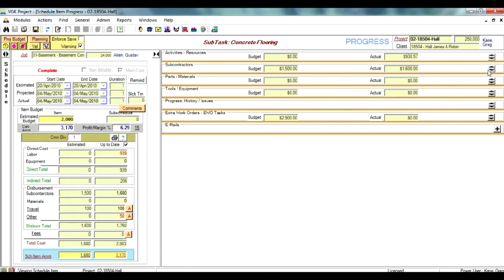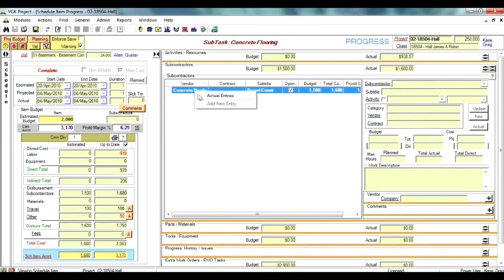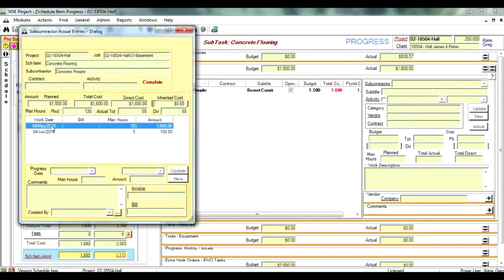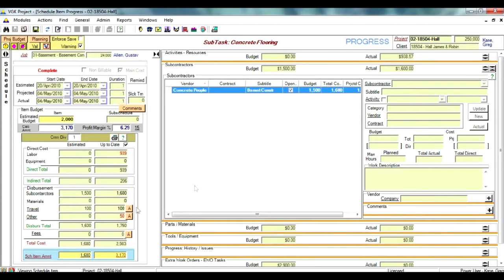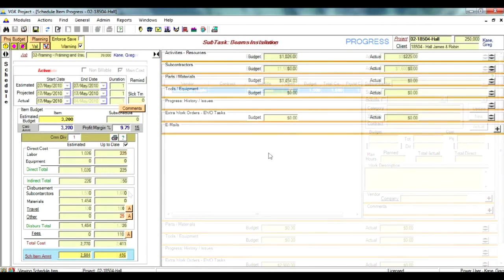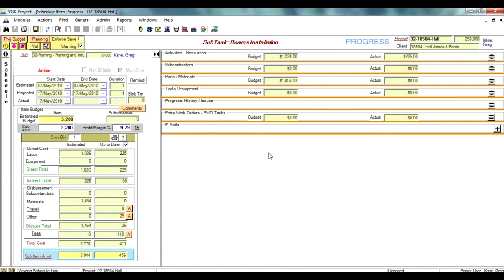Subcontractor might be a significant cost contributor, but also a major overspending reason. On a regular basis, management checks subcontractor work, verifies its quality, and records subcontractor progress. As part of progress information, the user logs a cost estimate for the performed work. When the subcontractor bills the company, the bill is applied through the VGK billing module. As part of this process, subcontractor cost is clarified and accurate cost data is applied to progress entries. VGK tracks subcontractor cost as well as automatically adds it to total task, job, and project costs.